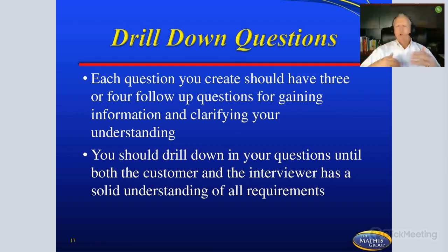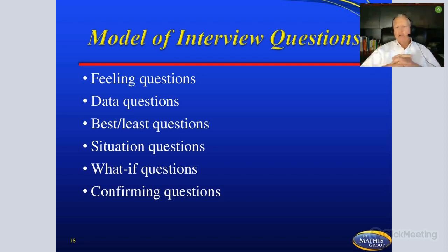So you might have 4 questions, and just through the middle of them sharing things, they verbally give you answers to 3 of the 4. So the only one you're going to ask is the one they missed, to be able to pick up that piece of information. So this is not something that is necessarily going to take a 5-hour interview. You're going to drill down to make sure that when you leave this meeting, you can eat, breathe, and understand what that customer is trying to accomplish and what their goal is.